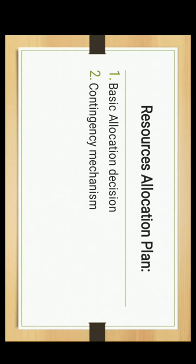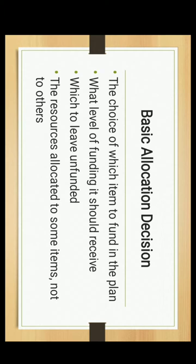The Resource Allocation Plan involves Basic Allocation Decisions and a Contingency Mechanism. A Basic Allocation Decision addresses: the choice of which item to fund in the plan, what level of funding it should receive, which items to leave unfunded, and the resources allocated to some items but not to others.